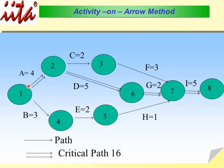Let's see the diagram. Activity A is represented by this arrow and it's for four months, so it will put its output into this location. Activity C depends on A for two months, so when this is completed, activity C will commence for two months. Activity D also depends on A and for five months. Activity F depends on activity C and will run for three months. Activity D puts its output here, then activity G is for two months and depends on activity D. It will also put its output here.